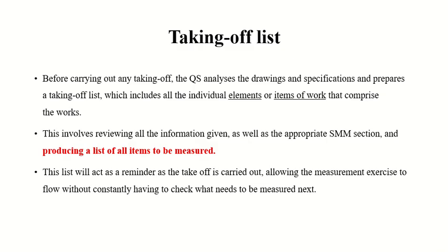was not matching with the drawing. One was saying 100 millimeters, the other one was saying 200 millimeters. So if you find anything like this, a conflict, what do you do? Matching the drawings and the specifications, they are showing two different things. The drawing is showing one thing, the specification is showing something else. So there is a difference between them. Now where do you go? To the contractor? That is the designer.